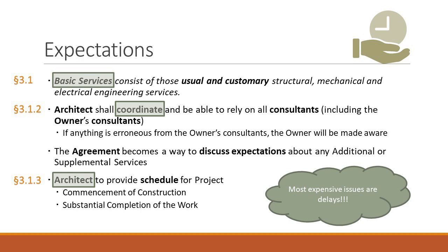So I, as the owner, will hire Stephanie and her team, and I'm going to tell the architect that. Well, the architect in designing its hotel or the overall space needs to coordinate based on this with my own specialty kitchen designer. So that's what this says, that the architect shall coordinate. You have to work with each other.